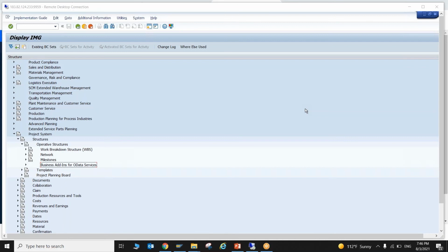There is one more, periodic billing. That is a specific part of SD where you can define your periodic billing. Let's say you want to go periodic-wise, like after 3 months or for a particular date. But for that you need to make a change in the item category, and when you change the item category, you will get one more option to define the dates. That is periodic billing.